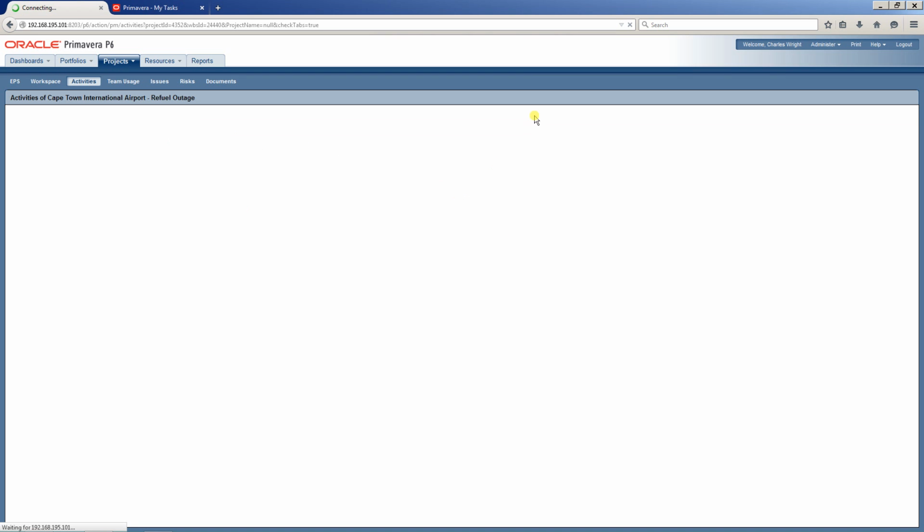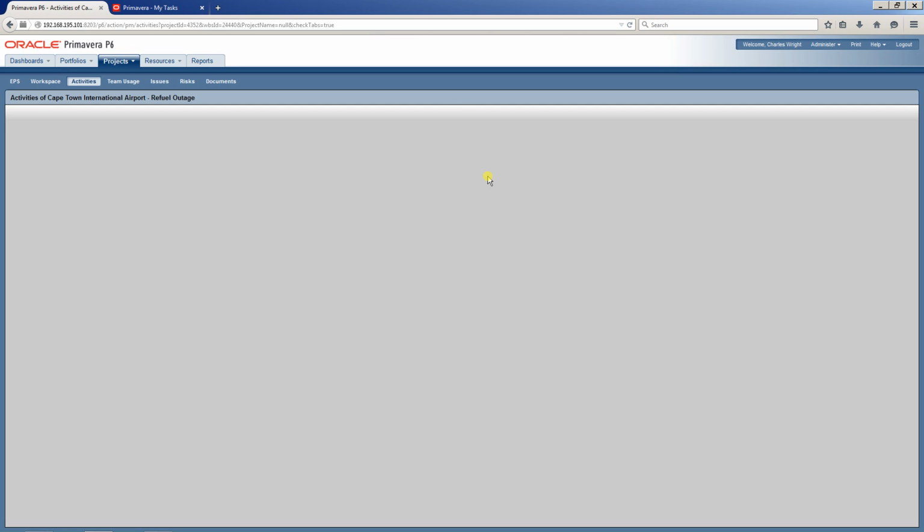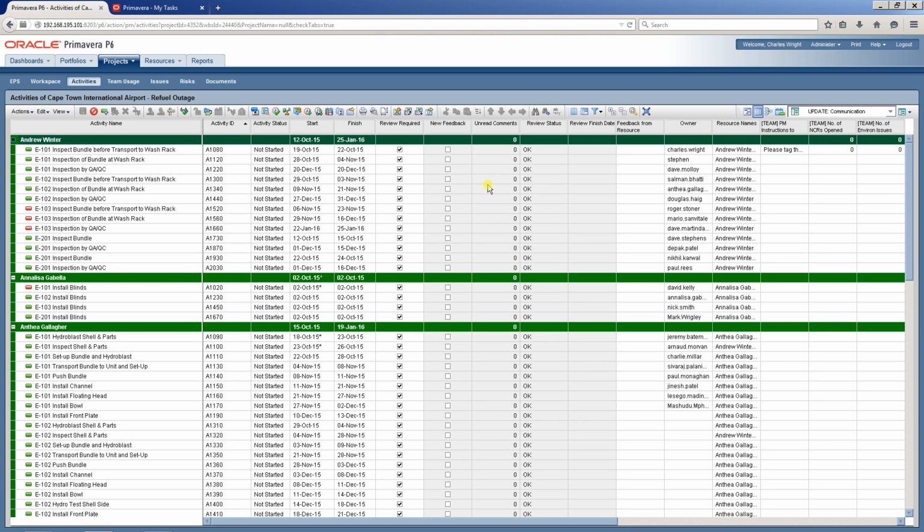Those changes that are made to the UDF or the start dates will not take effect until I've approved it. So it doesn't just allow any updates. You can switch that off if you want to, but it's a great feature and it allows control, because maybe they might say, oh, we're 100% complete. You go on site and you have a look and you find out that it's not actually 100% complete.